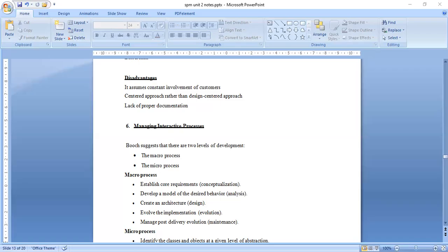Okay, so the benefits are, the risk is inflation. Lines of code measures reward low-level language because more lines of code are needed to deliver a similar amount of functionality. Okay, LOC measures are not useful during early project phases where estimating the number of lines of code that will be deliverable is challenging.